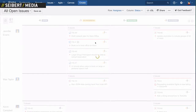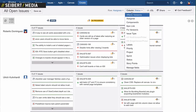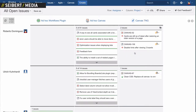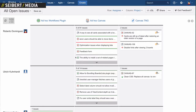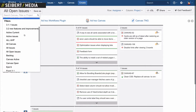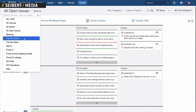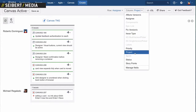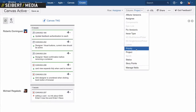I want to see all the outstanding issues per project and how they're assigned to people. I can have a filter already that would tailor my needs. And you can save your filters. Whenever I'm in a situation where I want to make sure that all the issues in my filter are up to date and looked through, I would create a canvas and work through the whole canvas. You can start looking at all your active issues and start working on prioritizing — set the priority, or you can estimate it. Story points — you just drop it there.